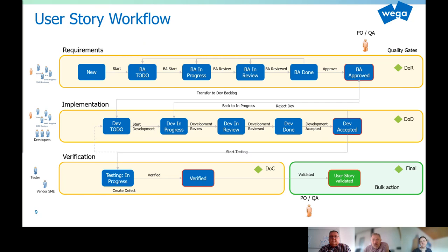During the implementation, testers will create the required test scripts. And we always try to have all the required scripts ready by the end of a sprint to be able to test our increment against these scripts before we demonstrate the achieved work to the stakeholders. If we cannot finish test cases for a story in a specific sprint, then the story cannot be accepted as done, although we might show the implemented functionality to the stakeholders to get their feedback. The story will be pushed to the next sprint and required testing activities will be finished. This will give us a very good position for the third and final process, the formal testing and verification step.